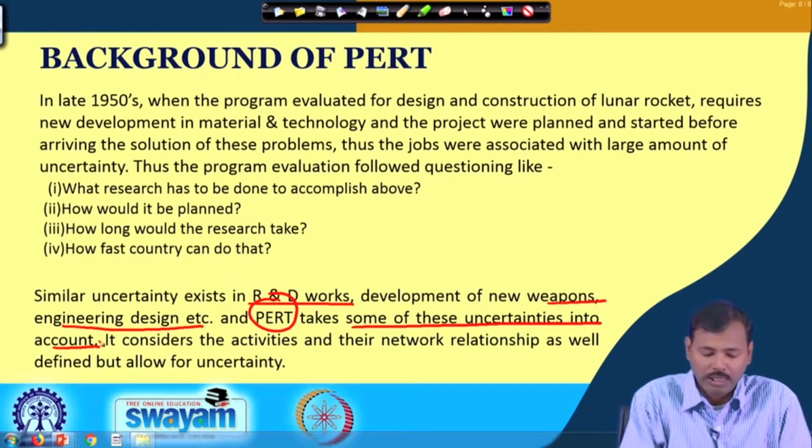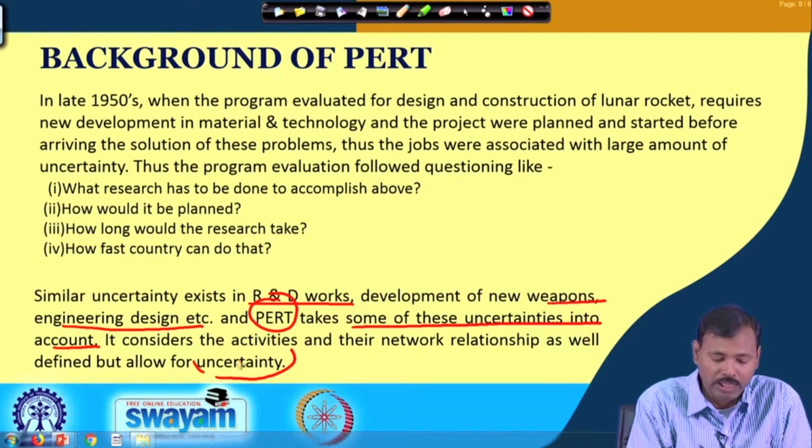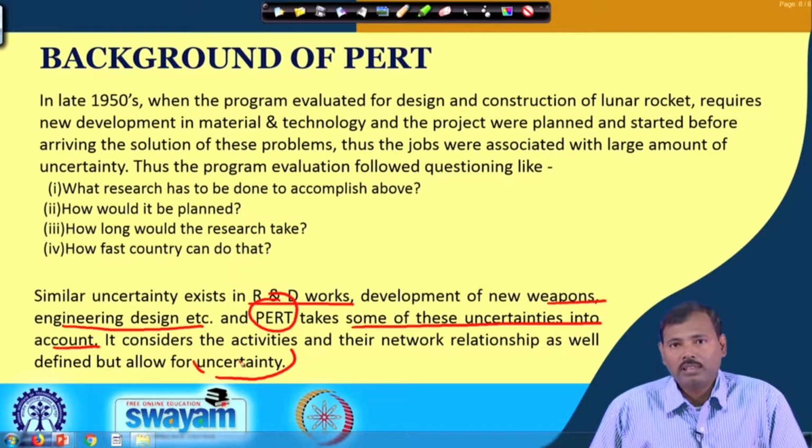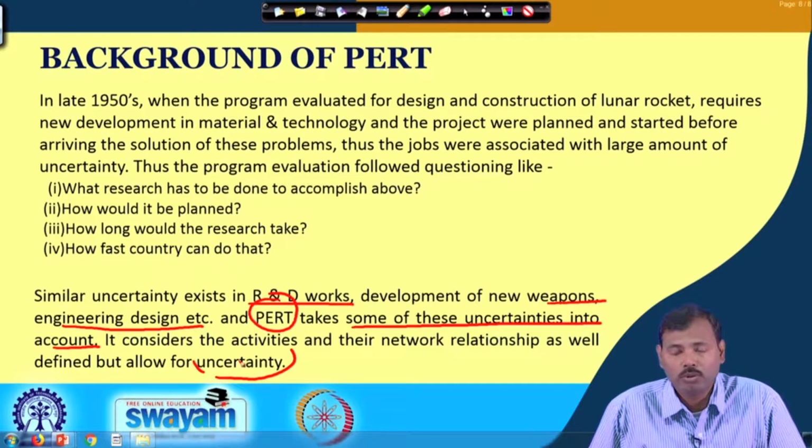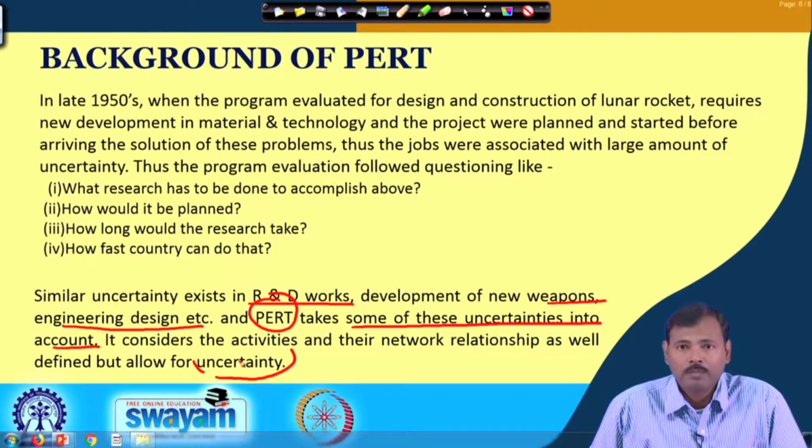There is a big uncertainty in this condition: this uncertainty is calculated based on the pessimistic, optimistic or most likely time which is considered, and as it is a probabilistic approach, what will be the exact time of completion, no one knows, no one can assess, but only the probability of achieving the target can be considered or estimated.